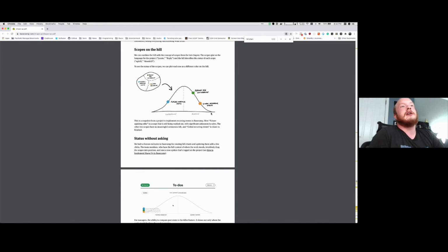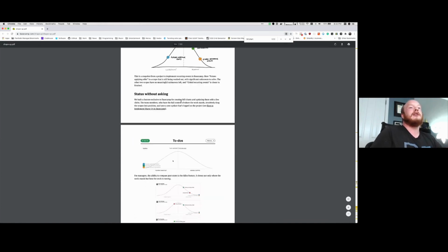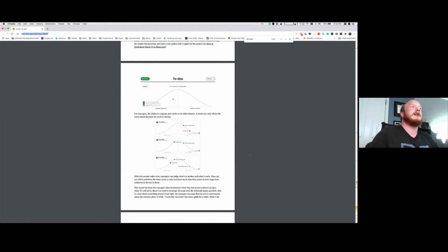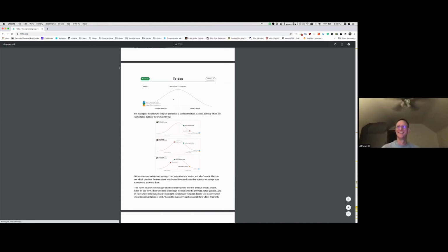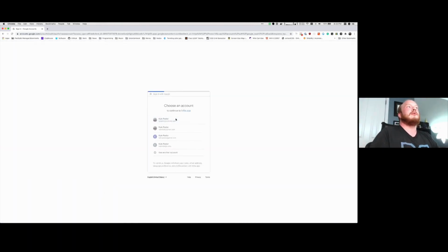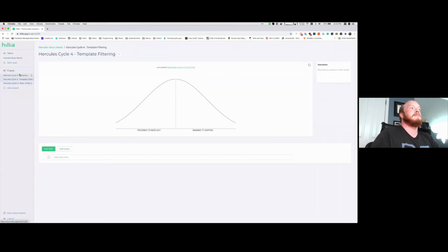The x-axis here describes the amount of time. So at the midpoint of the cycle, approximately 3 weeks, you should have hopefully most of your points past the known line. Our company was looking at how do you describe this, because in stand-up, what am I supposed to do, say these two scopes are 3/4 of the way past the midpoint? What we found is this really small app called Hylia, directly tied in with Basecamp.